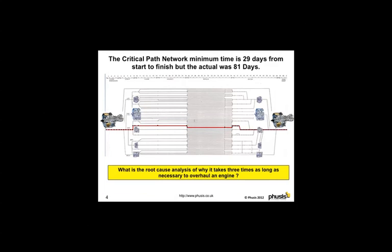In this client example, the absolute minimum time is 29 days — but remember, the contract is 56 days and the client is taking 81. So why does it take three times as long as necessary to overhaul an engine?